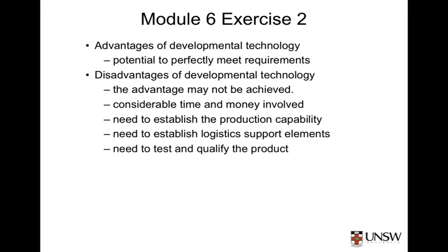Firstly, even though we try to design something to be perfect, it may fall short. It will probably take a considerable time and a considerable sum of money to design and build something from scratch compared to buying it off the shelf. We will also have to establish the production capability and all of the logistics support elements, such as spares, test equipment, tooling, training, and so on.